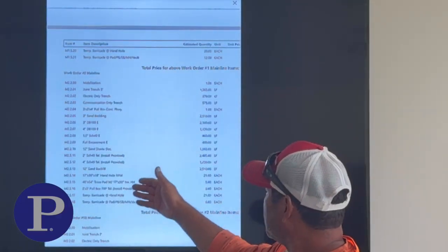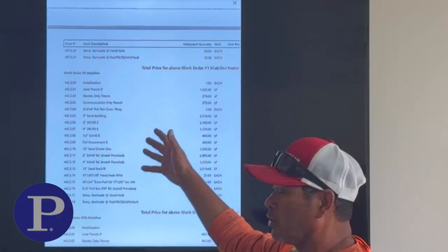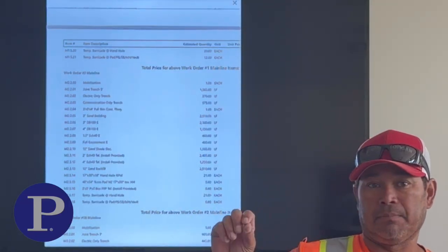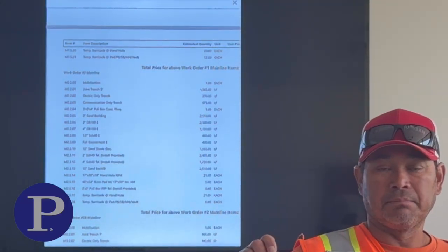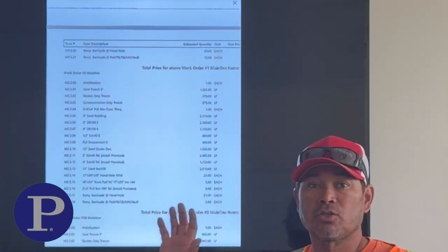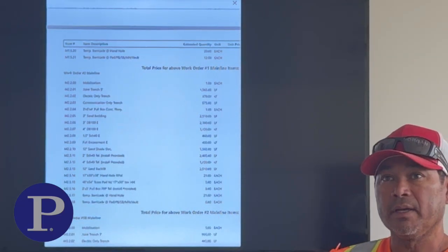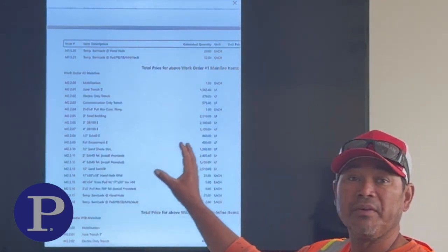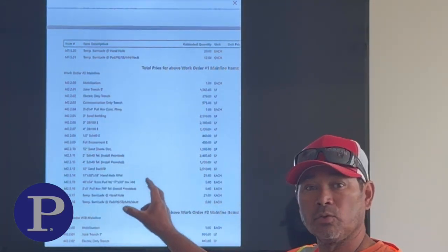I want to mention another thing. The scope of work, as you see, doesn't reflect multiple items. There are small items like duct tape, glue, plugs, and grounding that are not listed here. So we always need to be aware that when we place those orders, we need to fill all the gaps that they don't do for us.